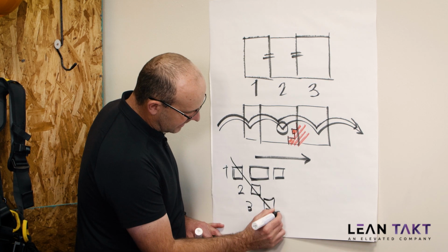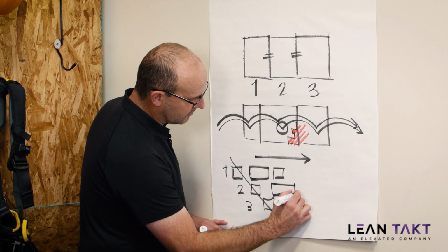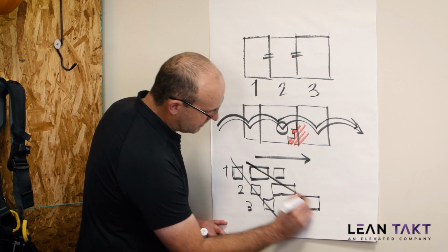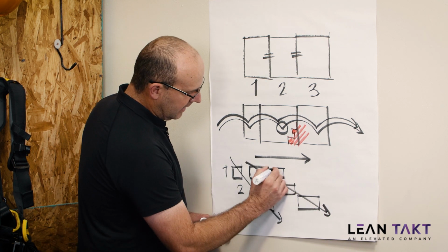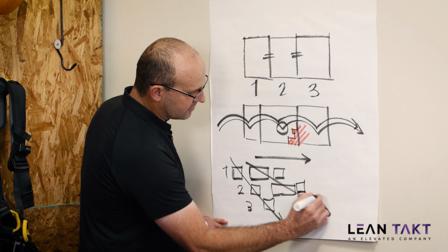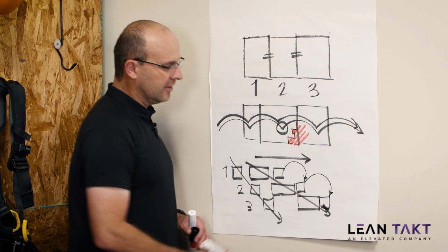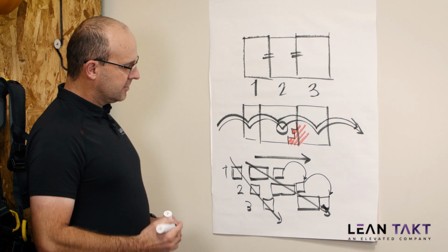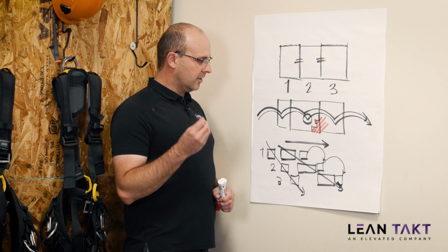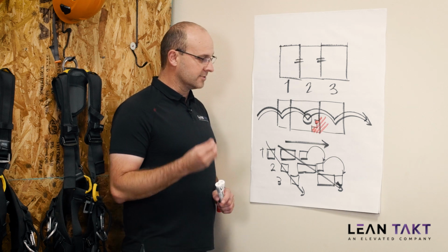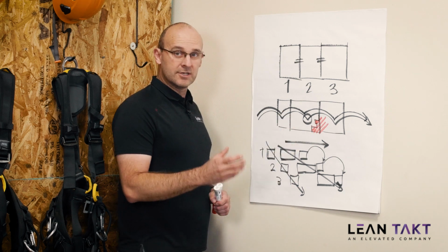Okay, you've got a nice cascade on that first one, but if the resource can only handle so much work, that bottleneck is going to put you at a different line of balance or a different rhythm on the end, and then that last wagon, there's going to be a gap, right, from here to here and from here to here, and we're going to get out of flow. So one of the things we can do is really take a look at leveling the way we package our wagons, our resources, in order to get a better scenario here. So here's what we would do.